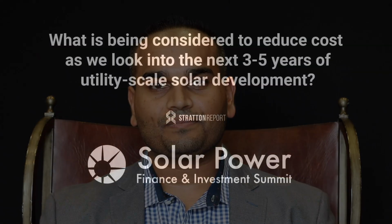For construction, we'll take a look at specifically reducing schedule. One method we do for that is minimizing the total construction duration, so the amount of time our crews are on site. What this does for us is it allows us to keep our general conditions cost down, which in turn translates to lower overall installed EPC cost.